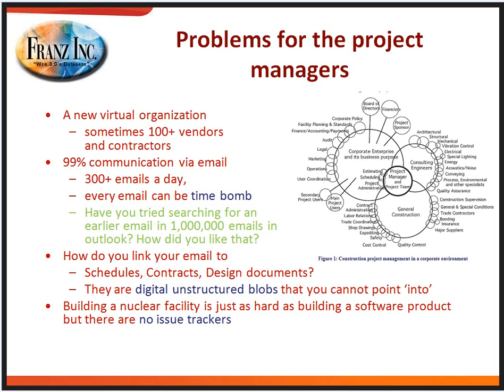So what you see in most contracts, that if something goes wrong, you have about 7 days time to complain in the notice. Otherwise, you can't later get back to it. So even a little simple email like, the door will be 2 days late, it's not a problem, yes, is already a time bomb. So you have 300 of those a day.